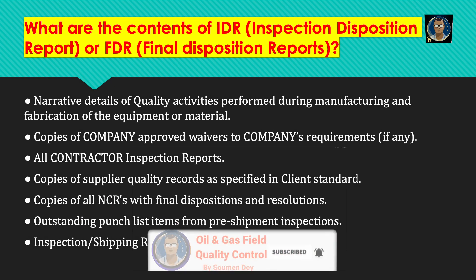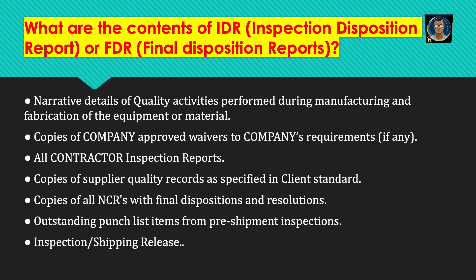What are the contents of an IDR or FDR? Narrative details of quality activities performed during manufacturing or fabrication of the equipment or material; copies of company-approved waivers to company requirements if any; all contractor inspection reports; copies of supplier quality records as specified in client standard; copies of NCR with final disposition and resolutions if any; outstanding punch list items from pre-shipment inspections if any; and inspection and shipping release as the final document.